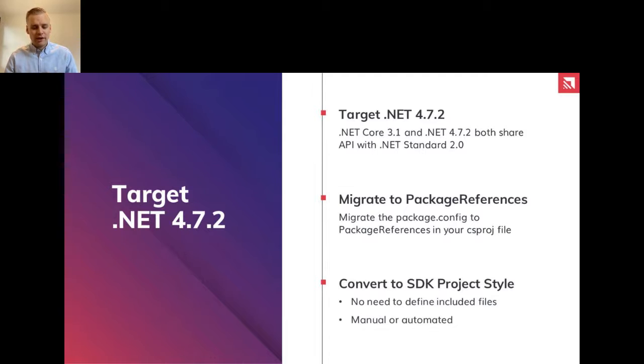And I want to prefix this discussion with something I forgot to mention: when we did this modernization with this client, we couldn't have a feature freeze. We couldn't have a long-running branch, and we couldn't stop doing feature development. We had to continuously deliver features to our business users as we modernized in place. That was a major constraint, because it meant we had to do all these updates in the project and release them to production every 2 weeks as part of our normal sprint cycle. So we couldn't have anything that was breaking all the time. We had to do this bit by bit, piecemeal, which I think worked really well, but it definitely is a challenge.